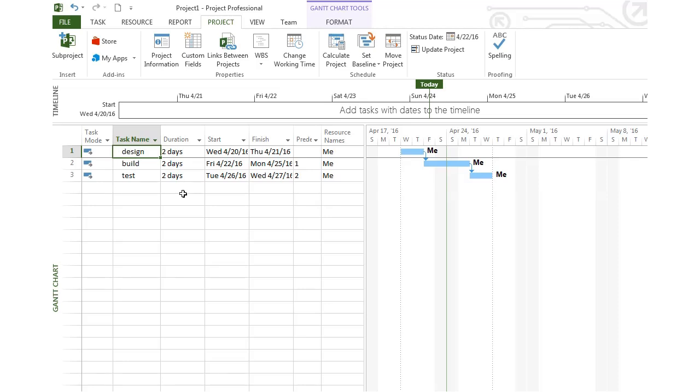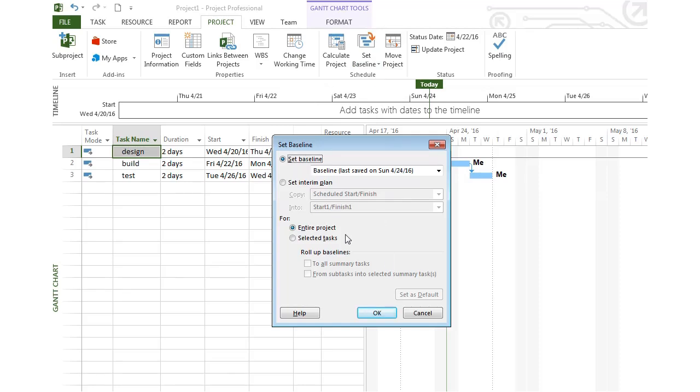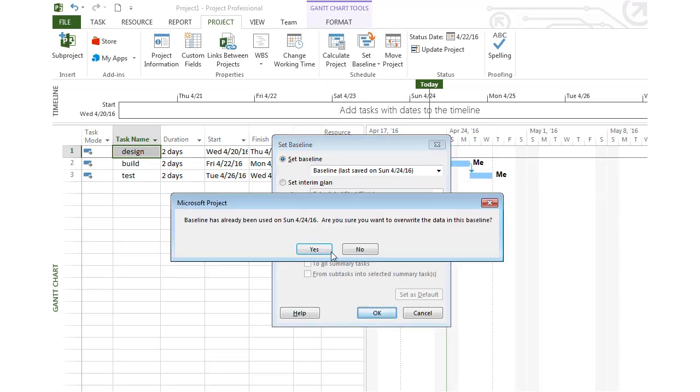Now this is just an estimate, just a guess. In real life, things may take longer or shorter. To create a snapshot of my planning phase, I can set something called a baseline. I set that from the Project tab, click on Set Baseline, and choose Set Baseline. I want to create a baseline of the entire project.